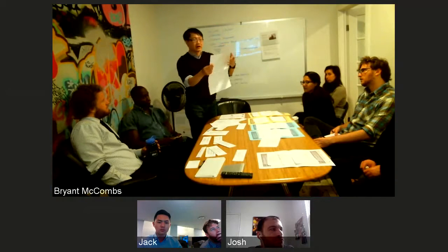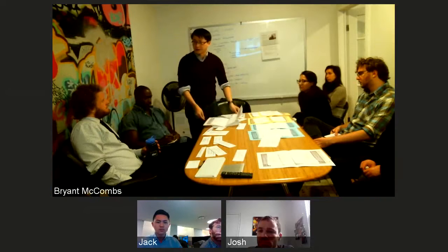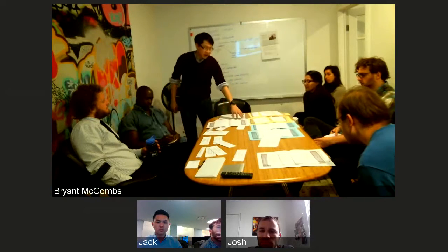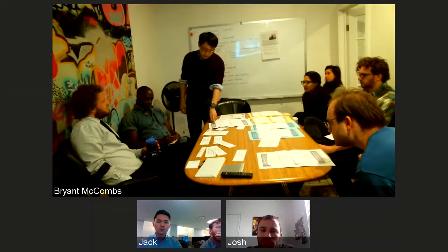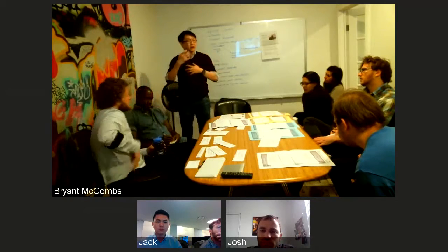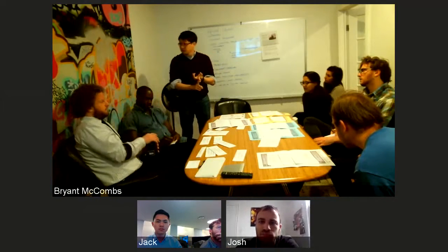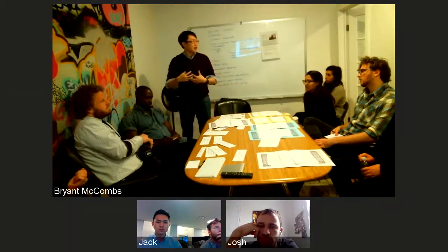That's because we have an hour blocked out for project communication that's just going to happen, answering emails, an hour blocked out for stand-up, 2 hours for iteration kickoff, 2 hours for estimation, and 2 hours for show and tell every week. Those are the engines that drive the ability to create more stories if you need them, to fix estimates based on information learned, and so on and so forth.